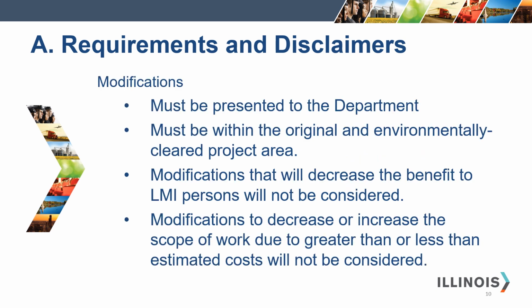Requests for modifications must be presented to the department prior to any changes being made to the project area, beneficiaries, cost estimates, or funded activities. All modifications must be within the original and environmentally cleared project area. Requests for activities outside the original project area will not be considered.